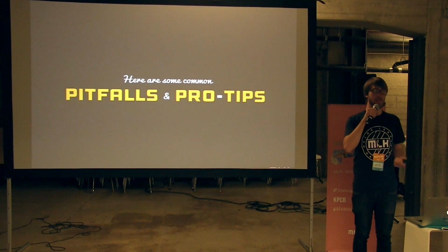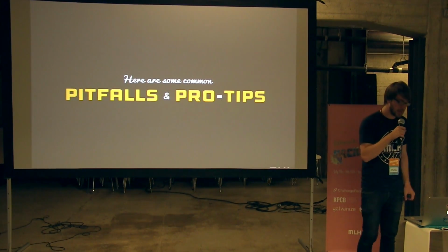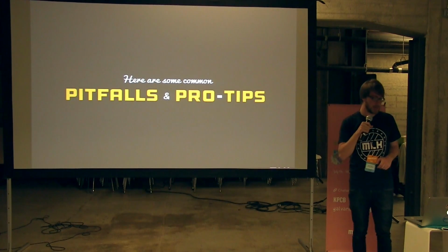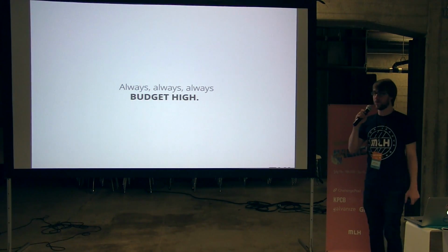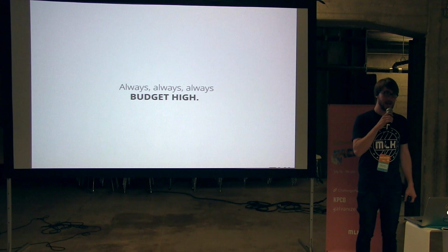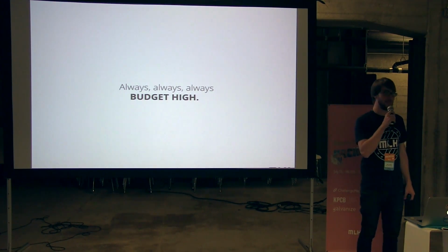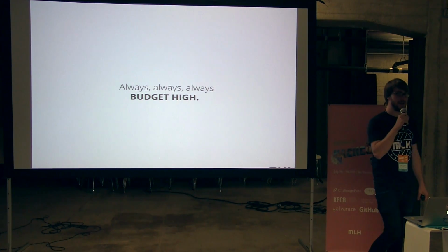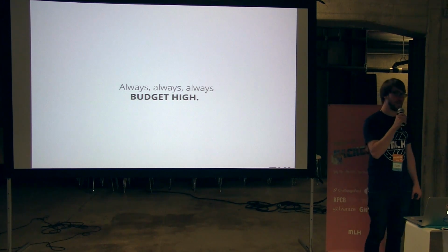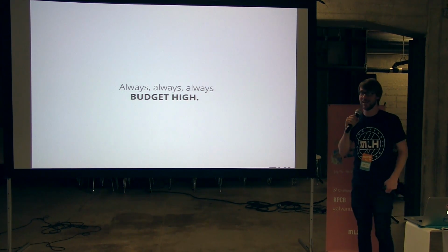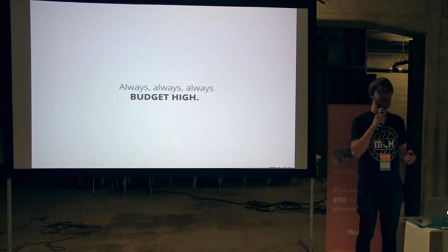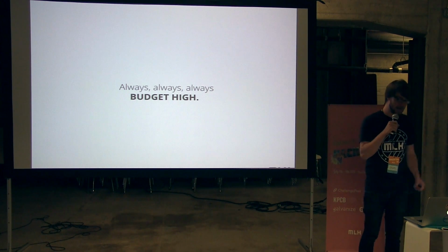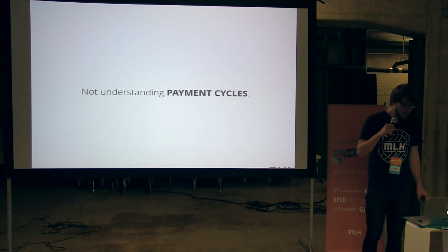Again, I'll send out all that information afterwards so you'll have it. I know there was a lot there. Let's dive into some pitfalls and pro tips that I've seen. So always budget high. I cannot tell you how much better it is to have extra money left over at the end than not enough. I promise you that you'll save a lot of hair. You're not going to rip it out at the end, and you'll also be a lot happier. So always budget more than you think you need. It's a lot easier to cut things from the budget that way too, and again, very much less stressful.